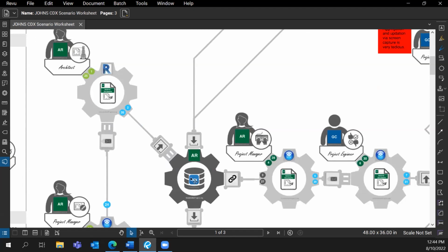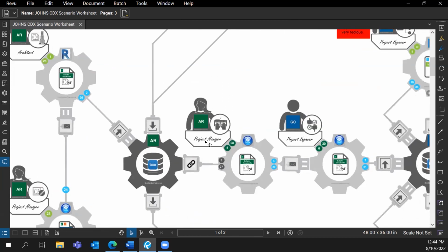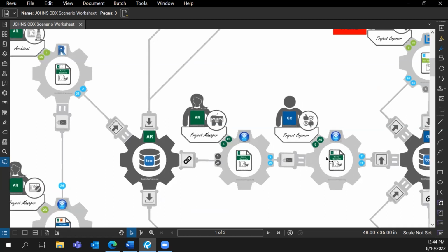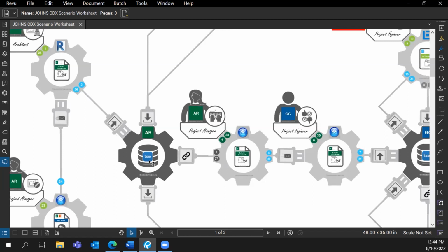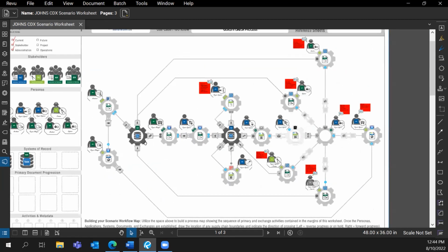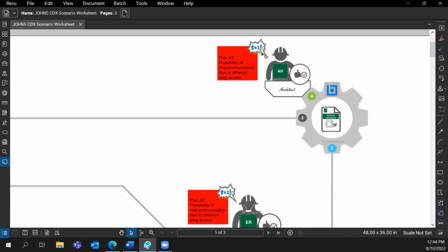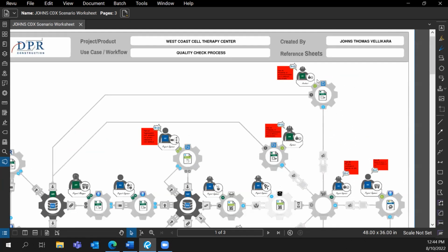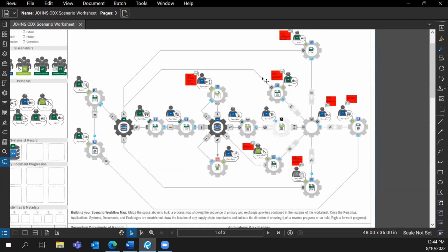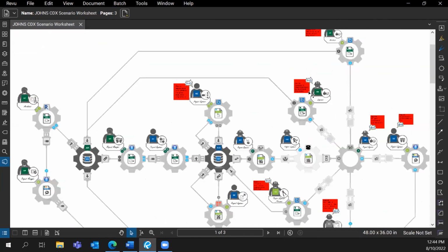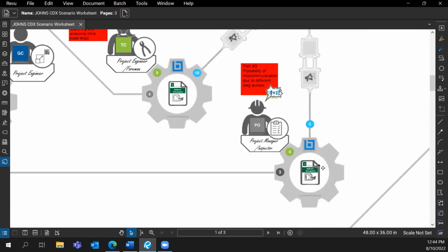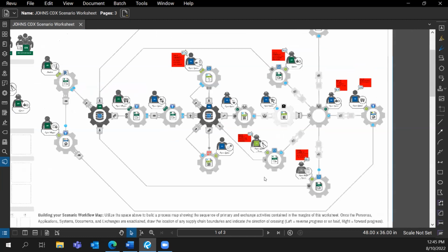To start, the architect sends the bulletin documents. The architect would be using their Box, wherein they upload the bulletin documents. From there, the project manager of the architect takes the link and shares it via email with the general contractor's project engineer so they can access the bulletin documents. These documents are shared directly from the architect's Box to the architect, the engineer of record, and the project owner, that is, the project manager or inspector, who would be coming on the site.